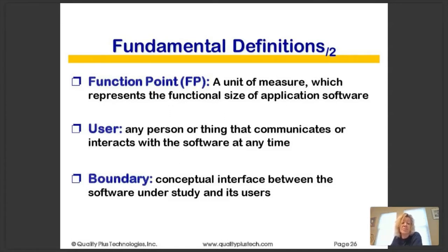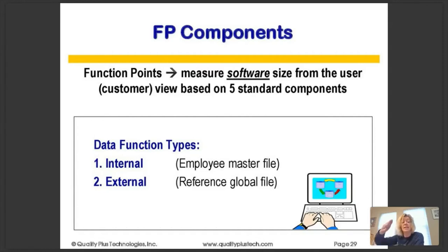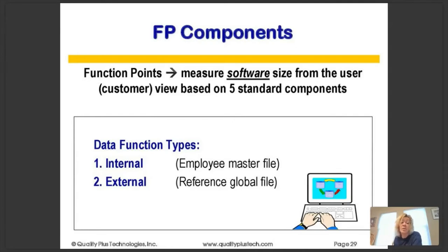We have the notion of a boundary — a conceptual interface between the software and the users. Users are always outside the boundary. Users could be another piece of software, hardware, a person, or a department. Function points measure software size from the user or customer viewpoint based on five standard components. We look at internal data — things like an employee master file — and external data, such as postal codes or zip codes maintained somewhere else like the post office. We get points for referencing that data.